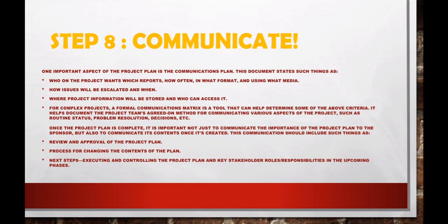Step 8, communicate. One of the important aspects of the project plan is the communication plan. The document states such things as: who on the project wants which reports, how often, in what format, and using what media; how issues will be escalated and when; and where project information will be stored and how we can access it.